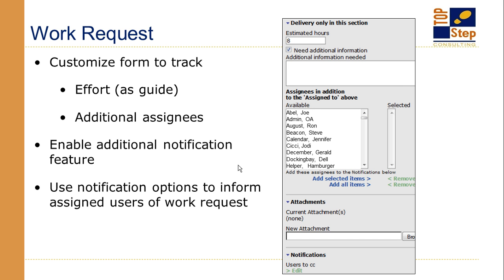Then you can create activity assignments and say, okay, I need you to write the timesheet training guide. I need you to prep the slides for the expense report course. That way you don't have to put that level of detail in your project plan, and people won't have to put that level of detail on their timesheets, but they still know what they're specifically supposed to be working on related to that task.